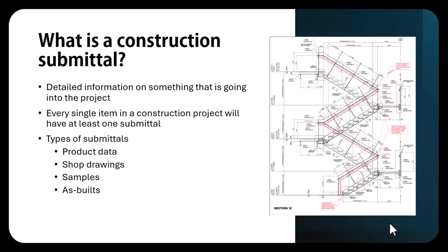and installed. Something else to think about is your architectural drawings will have information on the stairs regarding their size, shape, color, things like that. Your structural drawings are going to then have the welding requirements, the weight requirements, things like that. The shop drawings combine the two. They force the subcontractor to say, I have looked at the architectural, I have looked at the structural, this is my combination, please approve it.